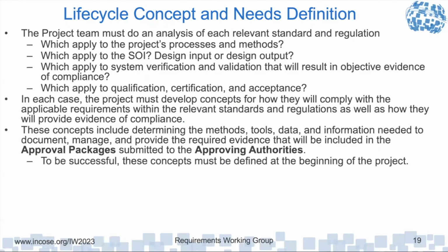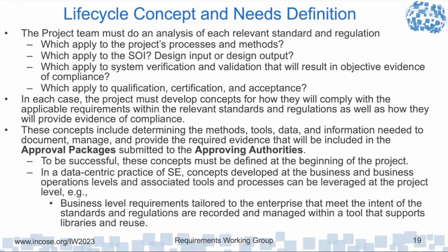These concepts need to include determining the methods, tools, data, and information needed to document, manage, and provide the required evidence that's going to be included in the approval package that's going to be submitted to the approving authorities. To be successful, these concepts must be defined at the beginning of the projects. And so in a data-centric practice of system engineering, concepts developed at the business and business operation levels, and associated tools and processes, are then leveraged by the projects at the project level.